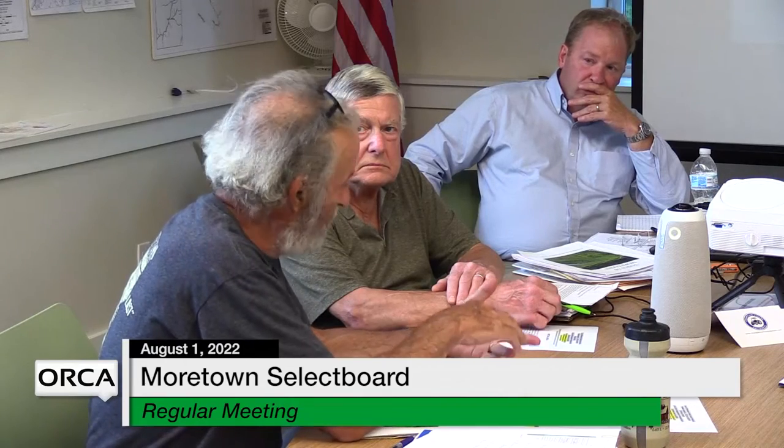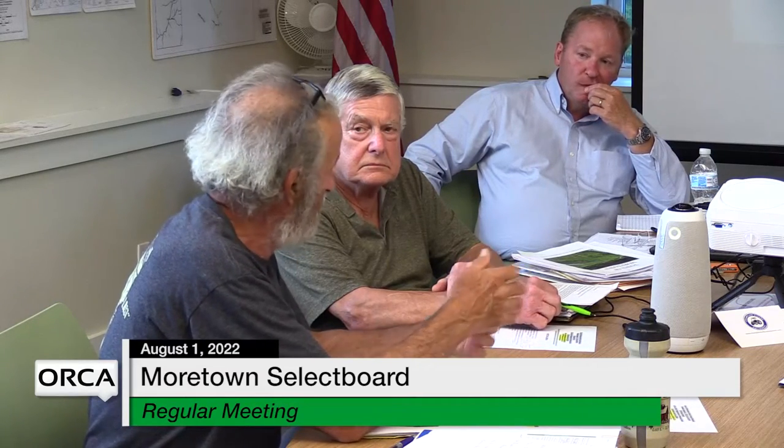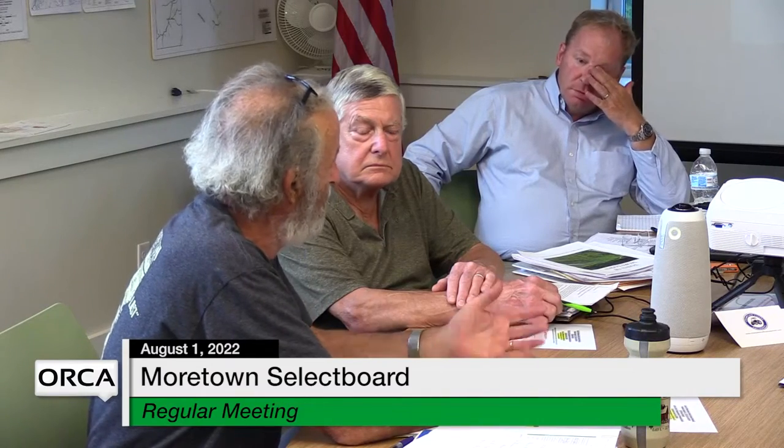As we did the vetting, we actually selected the firm that came in with the lower price, but without knowing that at first. And so we got a price for $22,902, which includes $8,500 in allowances to do some of the mechanical and the site work and water mitigation studies, and also one of the fees in that allowance is to hire a construction estimator. So once we have the final design of what we've all picked, we can then have it estimated so that we can see what the costs are before we put it out to bid, or we can vote on it.